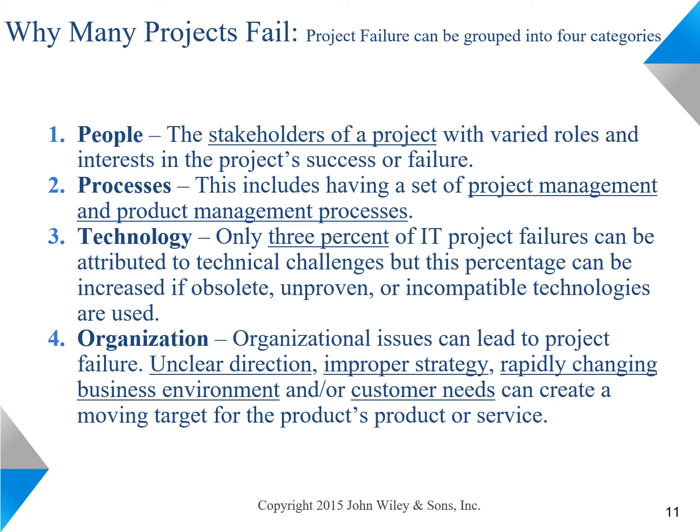In the particular example I just shared with you, one of the main reasons for the failure of that project was that they had a very long requirements gathering process without actually putting any part of the system in place. And that was one of the causes of the failure. The other cause was actually the technology that project had used. It turned out that it was not a proven technology and they didn't have the proper skill set to use it either.